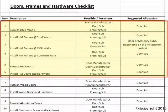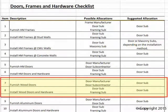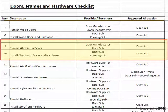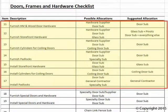Wood doors and aluminum doors, frames, and hardware should all be allocated to a single door subcontractor. Storefront hardware involves a non-intuitive split: the glass subcontractor provides the pivots — the storefront door hinges — but the door subcontractor furnishes all other hardware such as panic hardware, lever hardware, and cylinders, because those items need to match the rest of the building. The glass subcontractor should install the hardware provided by the door subcontractor, keeping one entity responsible for the total package.